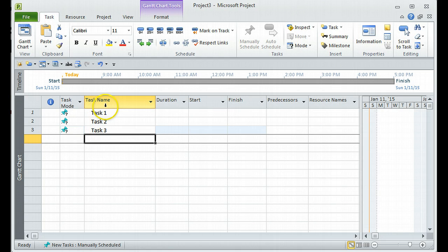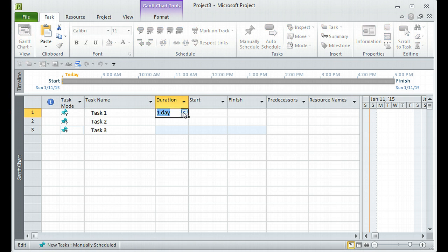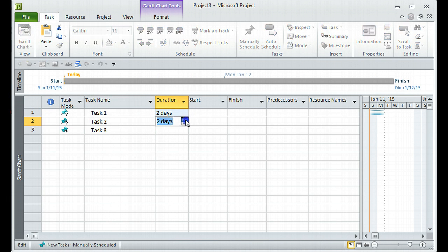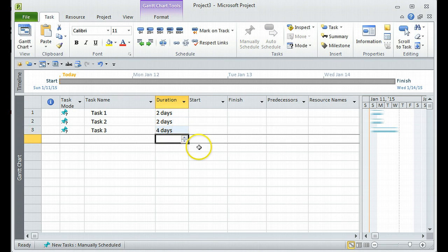You would see that this has only created the tasks but hasn't really given any durations. You may want to add durations for each task. So let's say Task One is two days, Task Two is also two days, and Task Three is four days.